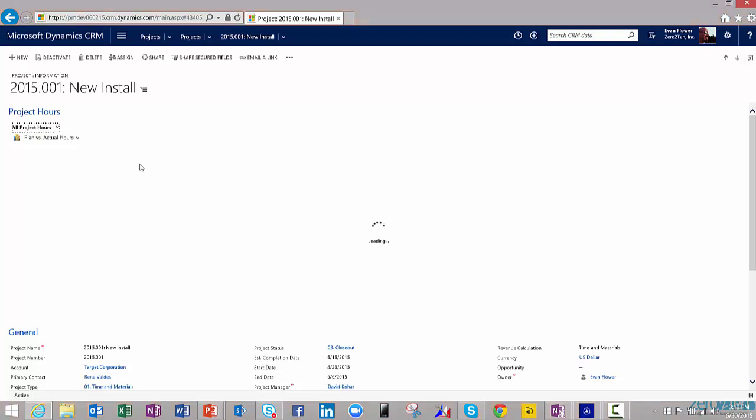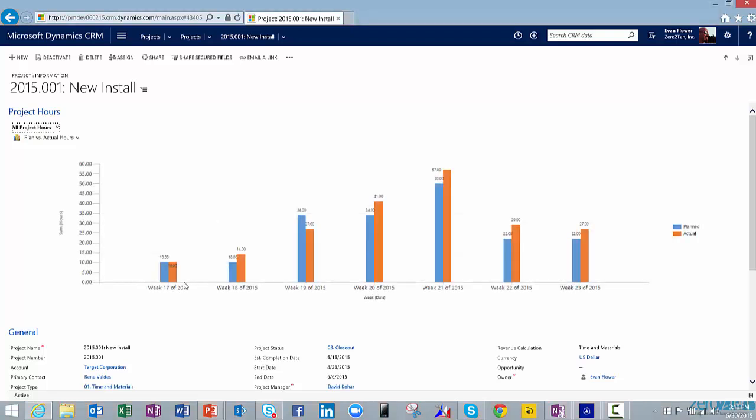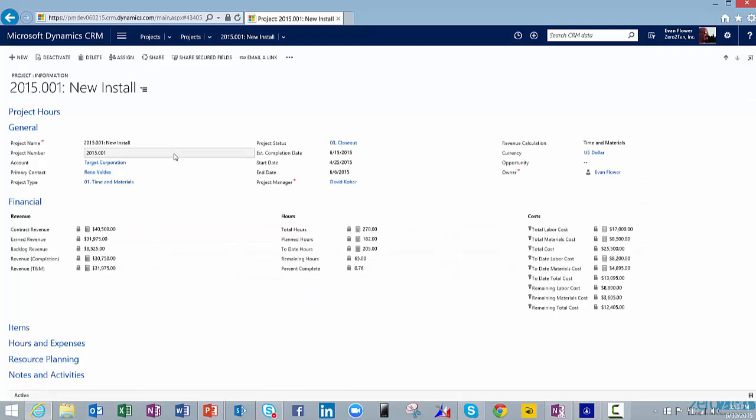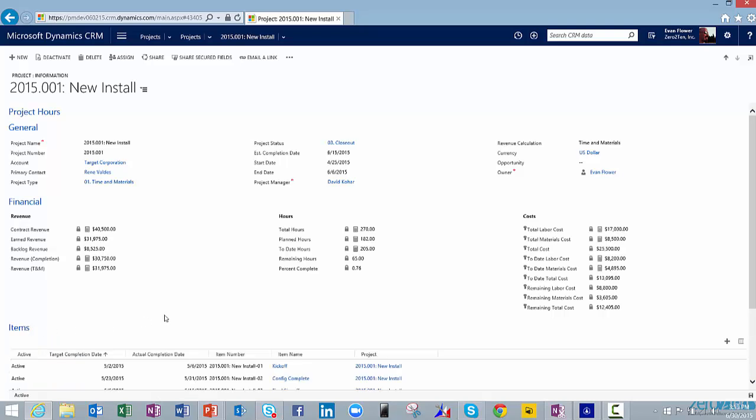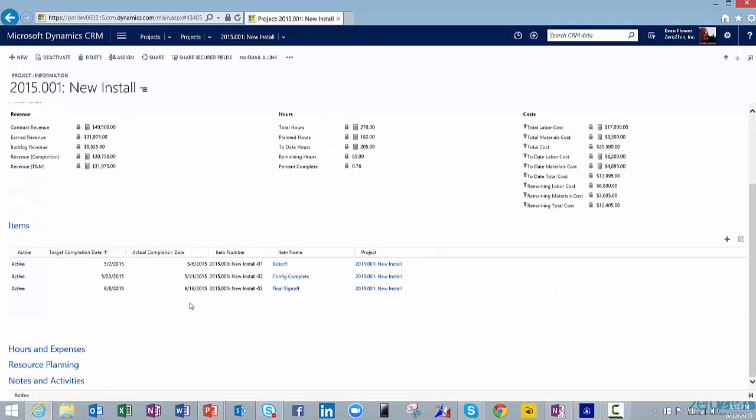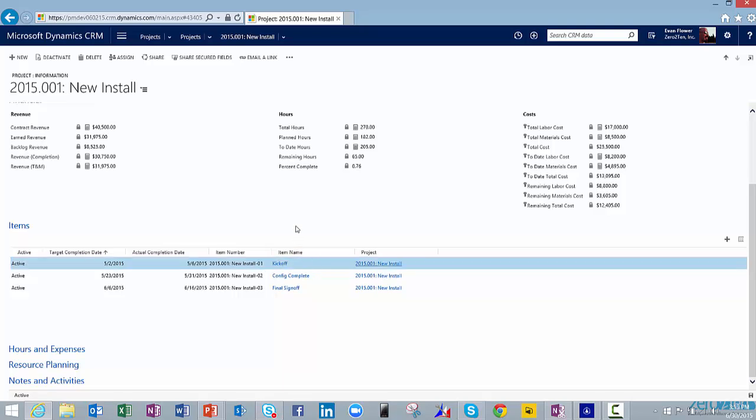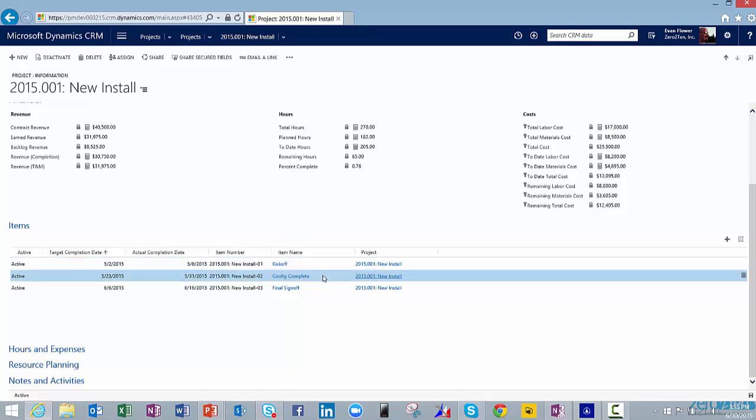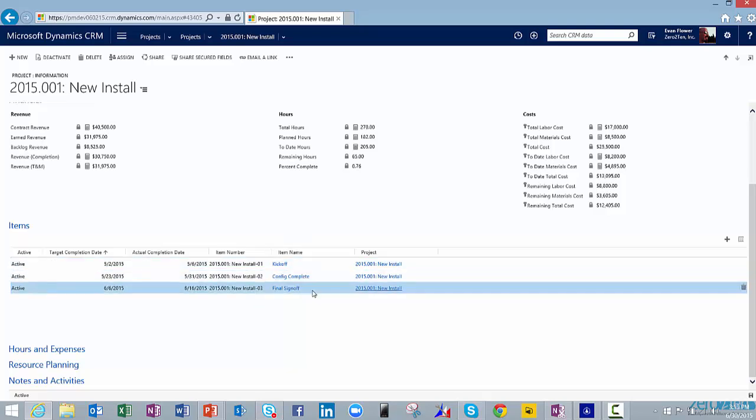I can come in here and say, show me all the project hours, and then I'll be able to get a sense for how was our planning of 34 hours in week 19 versus our actuals, which was 27 hours in week 19. So we can see how we've actually done from a planning standpoint. So some good project visuals to see. When I go down one level deeper from the project, I can look at those individual items. We have this particular project broken into three component parts: a kickoff item, a configuration complete item, and a final sign-off.